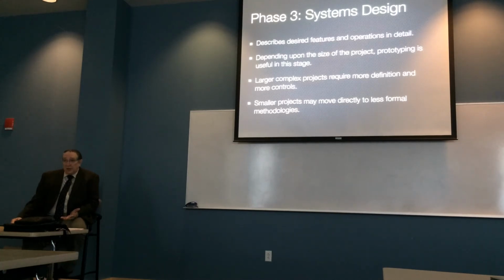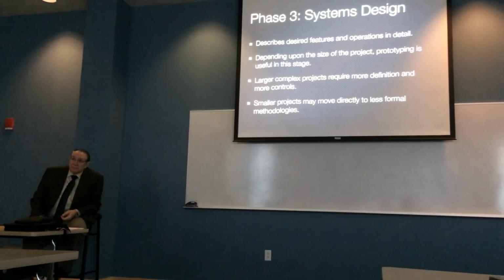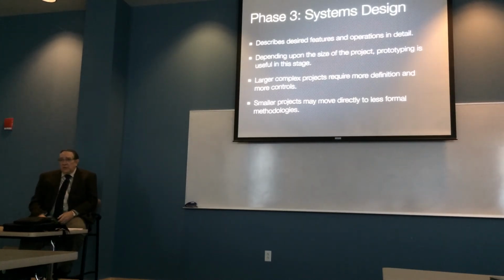I love short projects. So one of the things I like to do is see things broken up into as many small pieces as possible, so that you can assess whether that deliverable really works. Plus you get quick wins. Quick wins are helpful. These projects that drag on forever are horrible. Plus, from a change management, change control perspective, even a testing environment, you can see the problems as you go. That matters. Big projects are really tough.